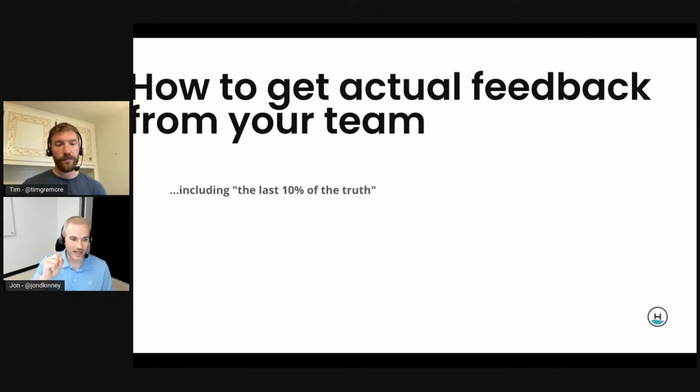And we do that to start. Hey, let's spend 10 minutes talking about what went well as a team, and then maybe 40, 45 minutes about what we can improve, and try to save the last 5 to 10 minutes for individual appreciations and call outs.